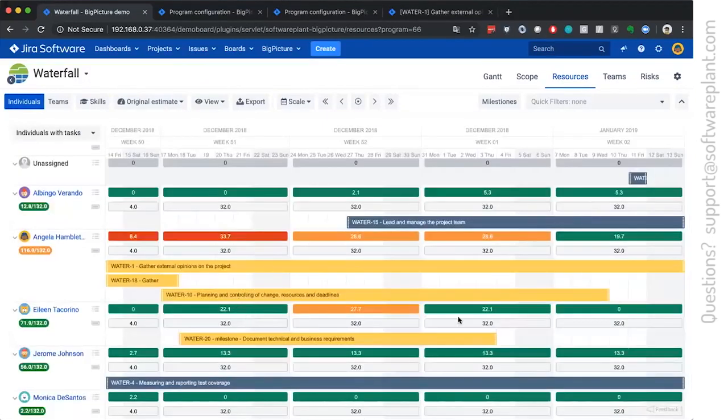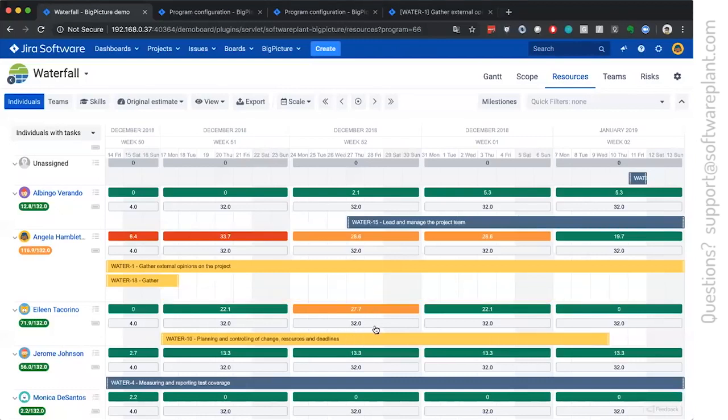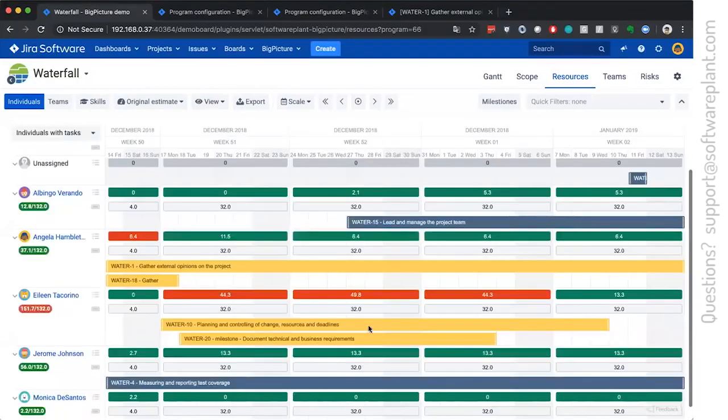So now we can see exactly how many hours per week she has to work to finish the task. And it's one task in case of multiple, it is just summed up.